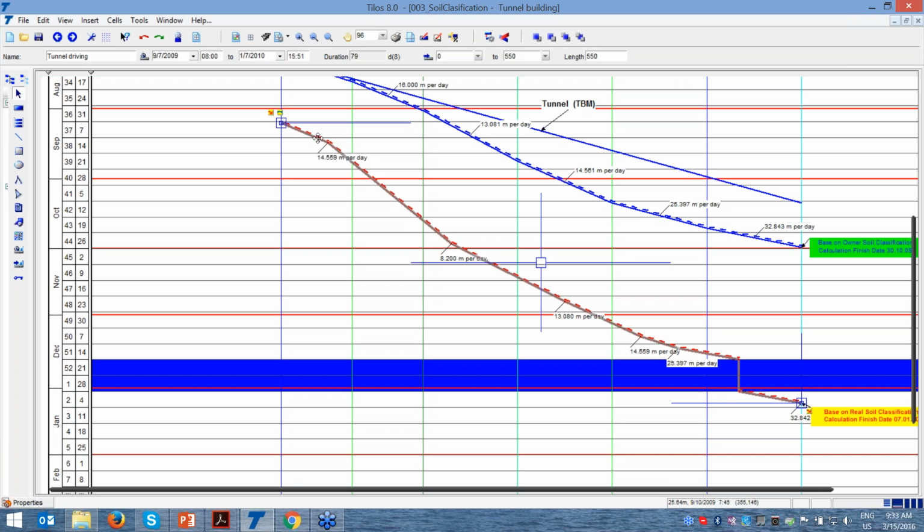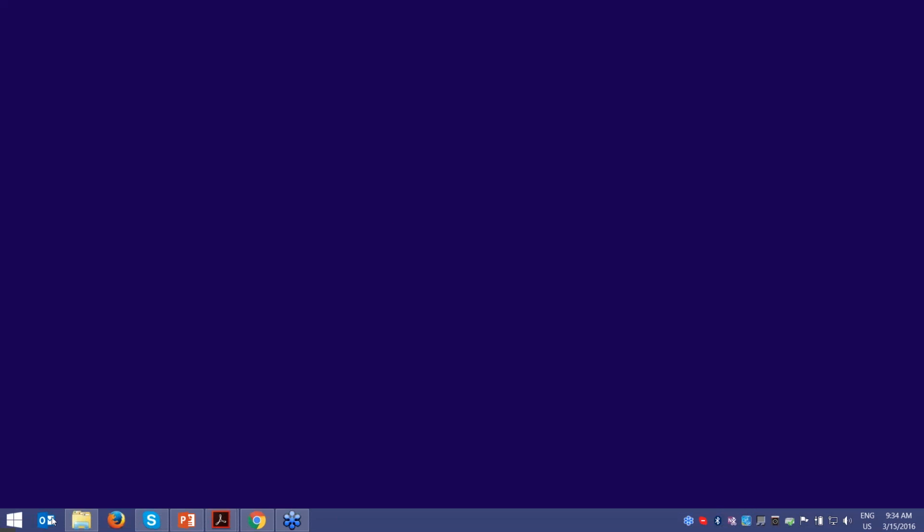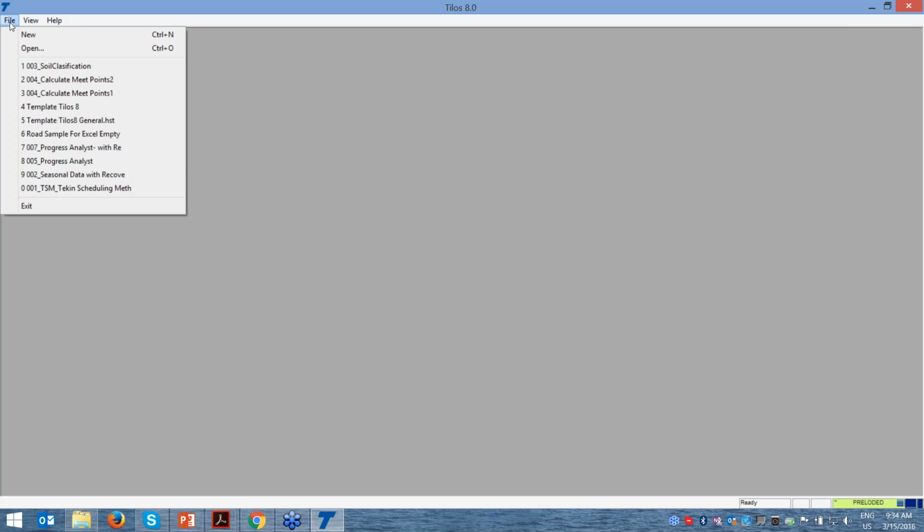In this example, we delay. Because of this delay, we come to holiday time, which is not working, and it costs us another 2 weeks of delay. This is a very good technique which we can present and show to our customer and team members. I would like to show you another example with TILOS, which is how it is also helpful if we have two crews working at the same time,